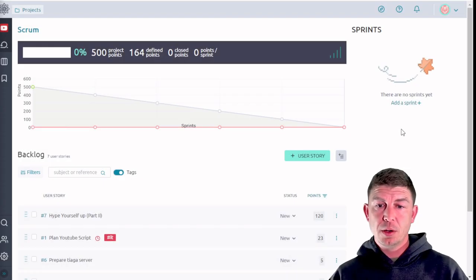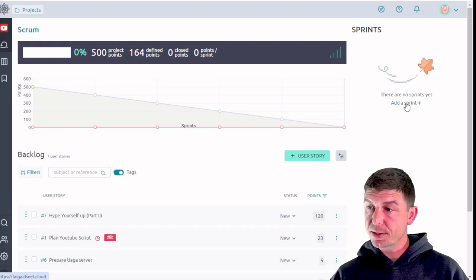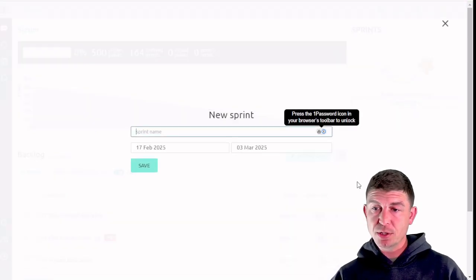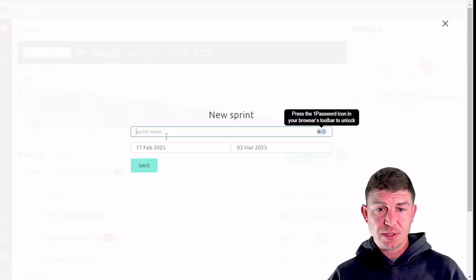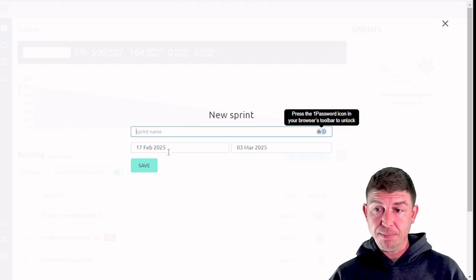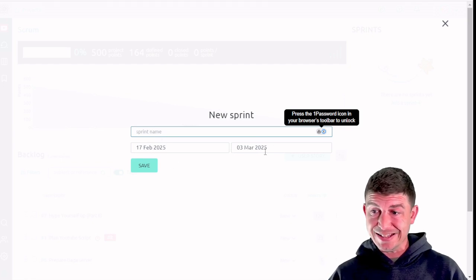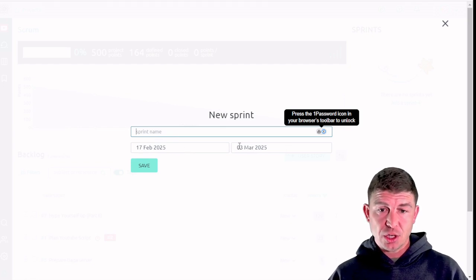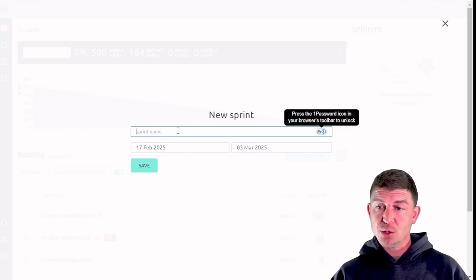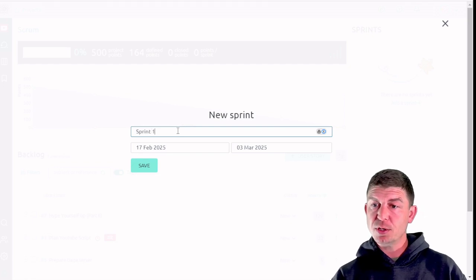So now I'm going to go ahead and create my first sprint. I'm going to click on add sprint over on the right hand side. As you can see it's prompting me for a sprint name, sprint start date, and a sprint end date. By default again this is two weeks and you can change that in the settings if you like. So I'm going to name this sprint Sprint 1.